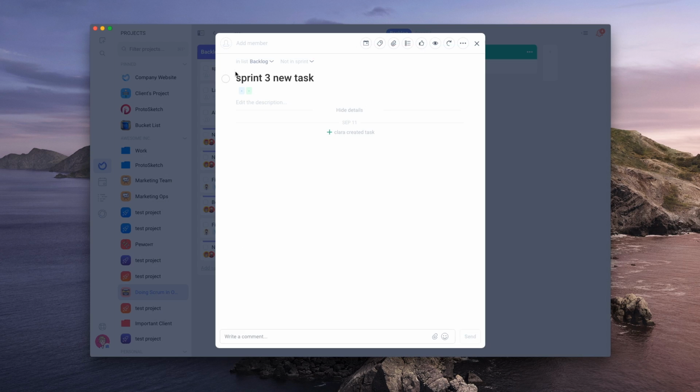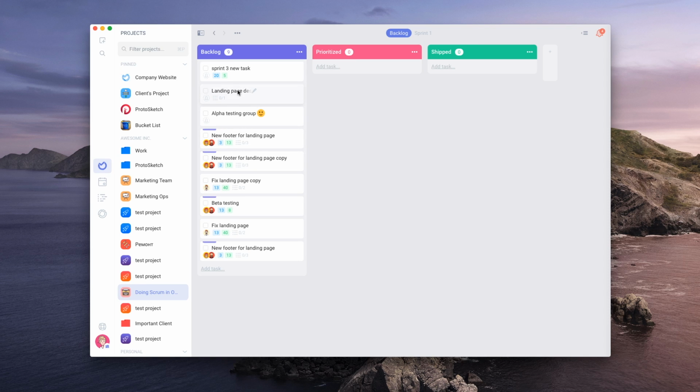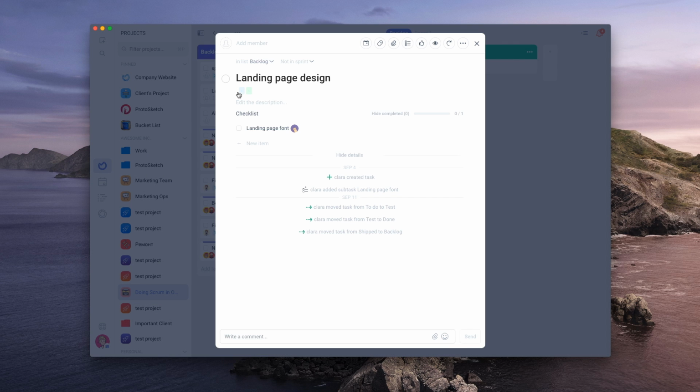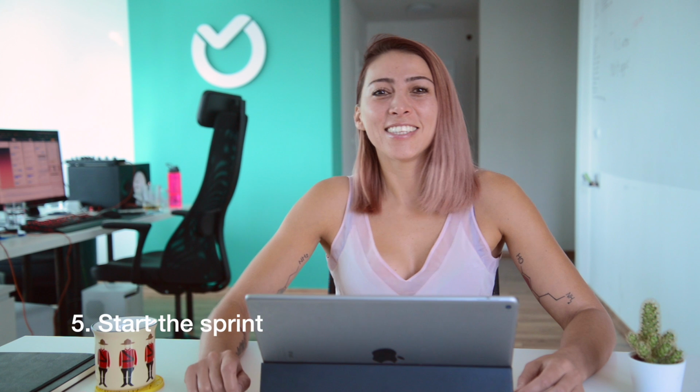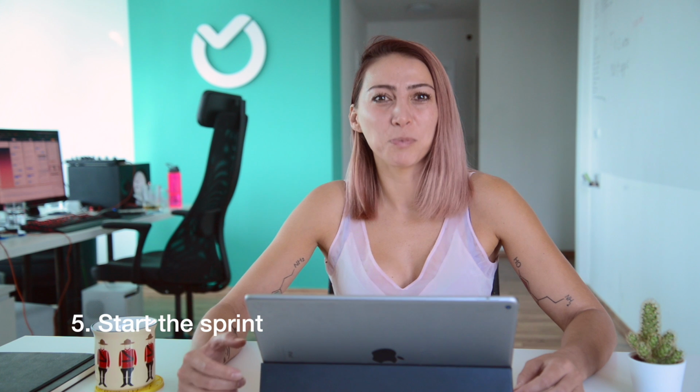Add story point estimates to your tasks by adding a number in the effort estimate in story points field and the business value estimate. Story points rate the relative effort of work in a Fibonacci-like format. When you're ready with the estimation and task prioritization, add the tasks agreed with your team into the sprint that you have created.